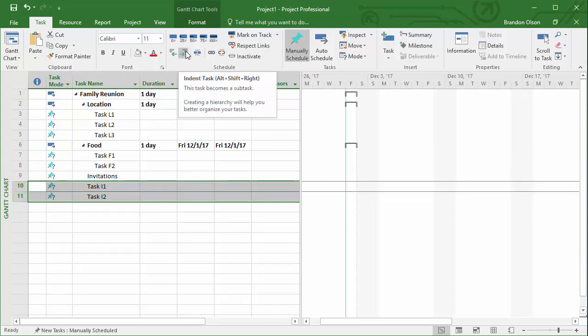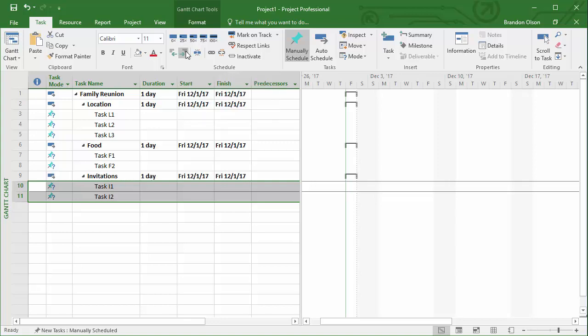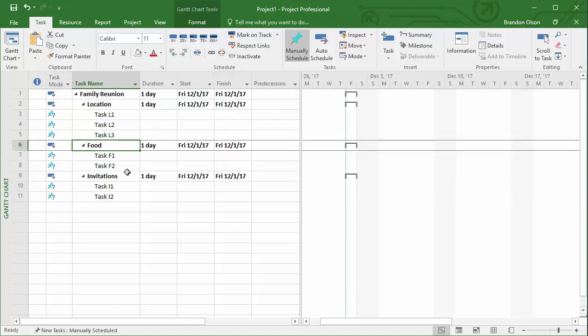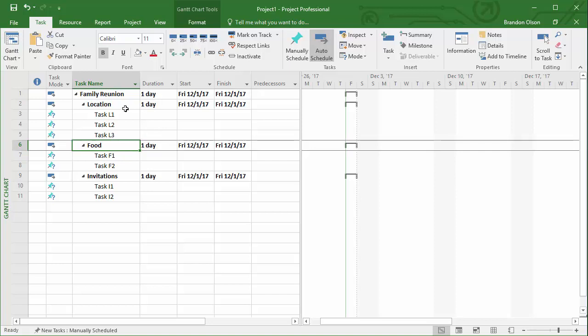It's just this indent task, and what we're doing is creating subtasks or a hierarchy of tasks as a result. One really nice thing is you end up with a roll-up structure. In the future, as I add durations for each of these tasks, the summation of those will add up for the component of the project as well as the overall project.